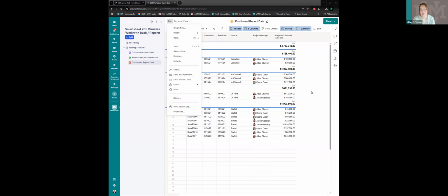The benefit of a live report is if I'm working on the back end, it'll show automatically. So if you send as an attachment, you do not need to share them to the underlying sheet, but it is sending as a PDF or Excel doc, and that's static. Exactly, it's one point in time, so if they want an update, you have to send a refreshed attachment. Okay. Exactly. Yes.